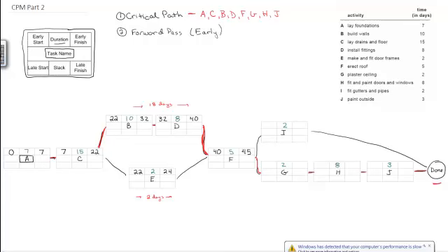And I move on, 45, 45, 47. G can't start until F is done, day 45. Also day 47, 47, 55, 55, 58. Okay. So this tells me that if everything goes as planned, I can finish as early as day 58. Okay. Great. All right.